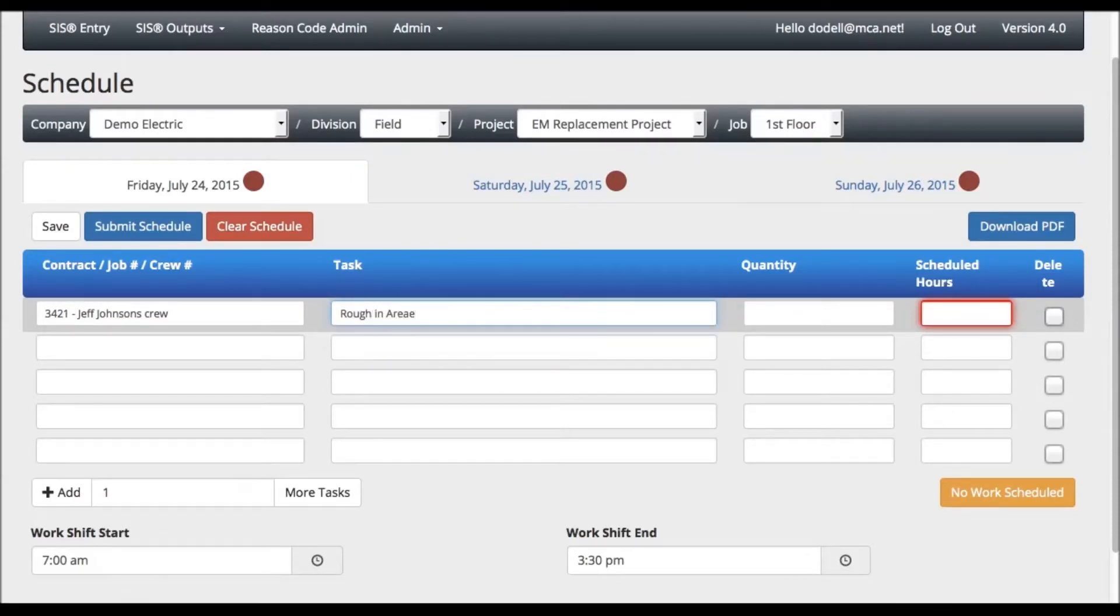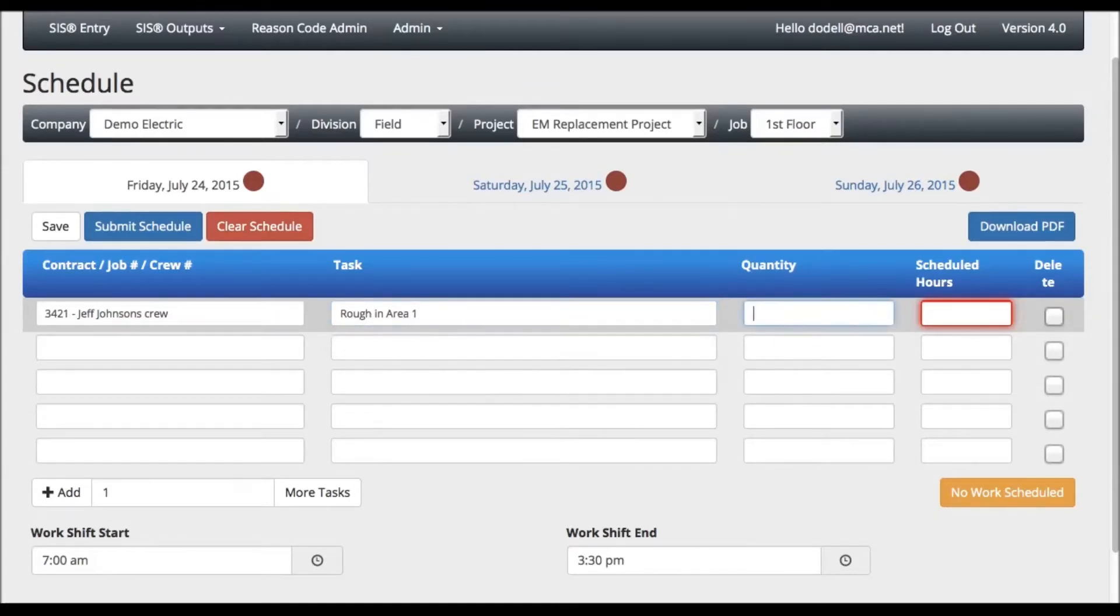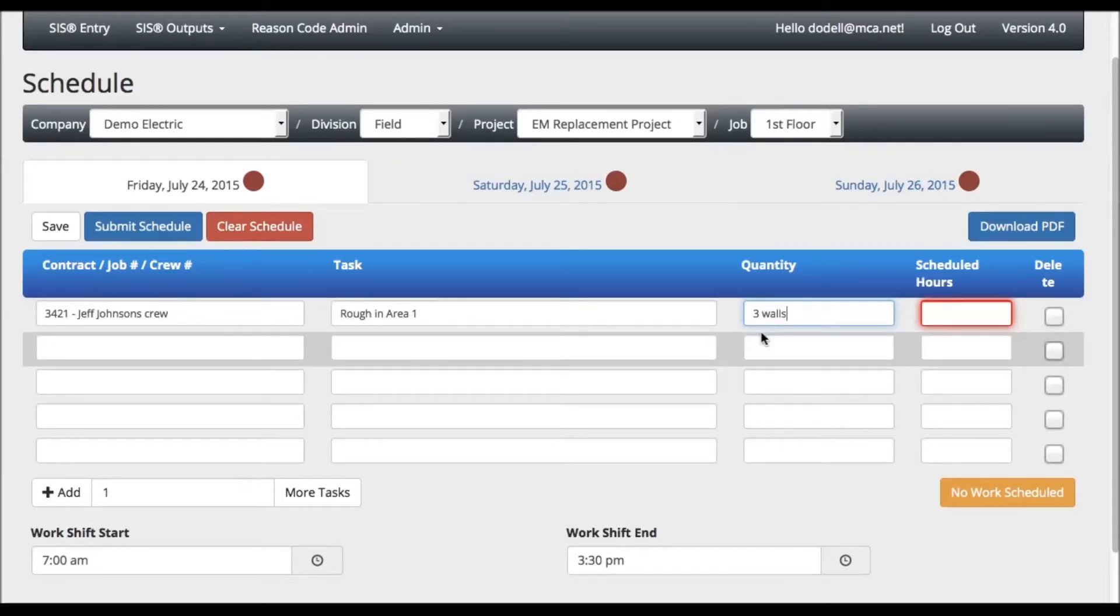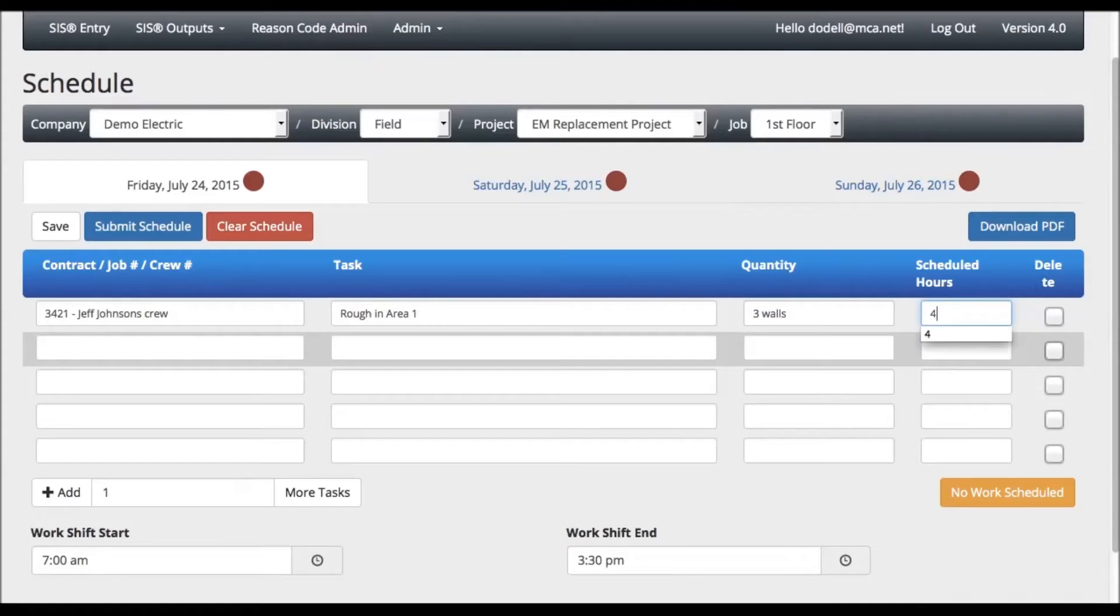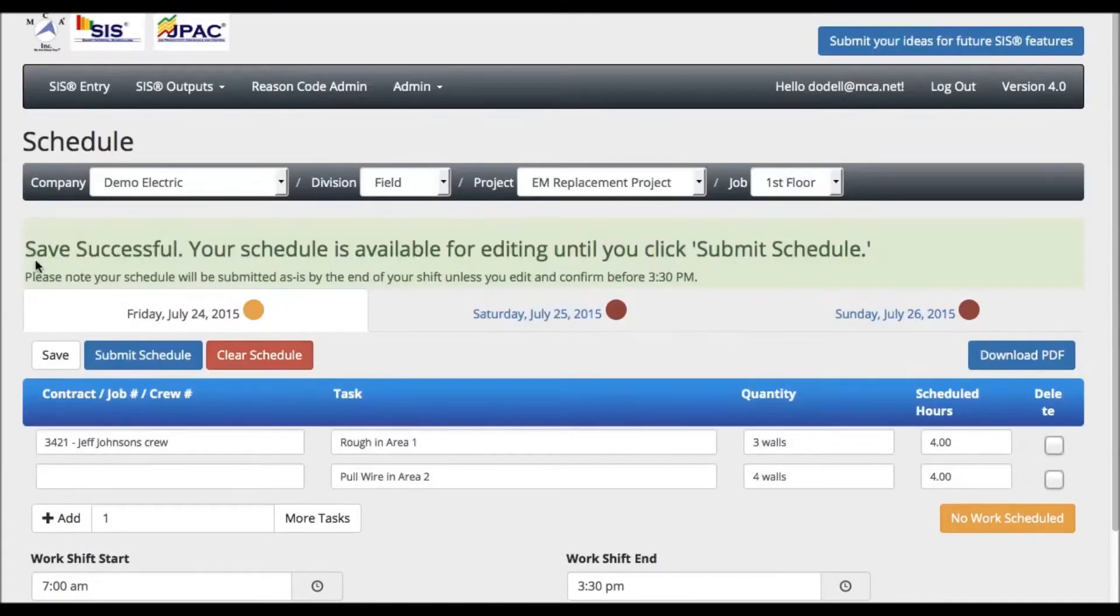When you tab over to the quantity column, you can enter the quantity associated with that task. Please note that the quantity field will not accept more than 50 characters. You will then enter the hours that you have scheduled for that task. After you have completed your daily schedule, you can either save or submit.